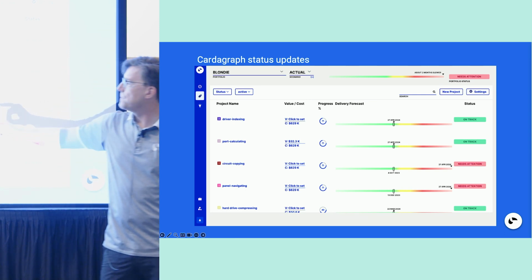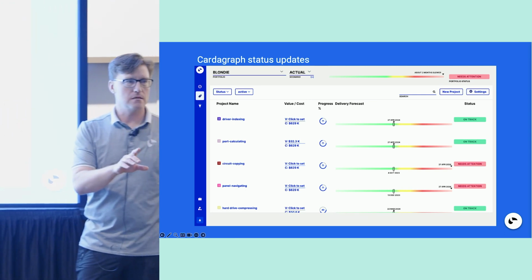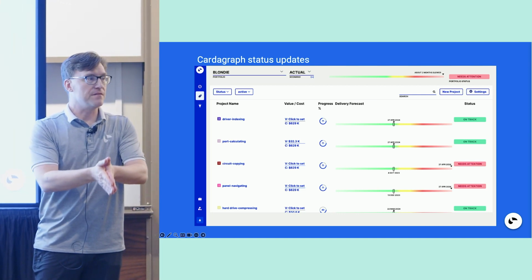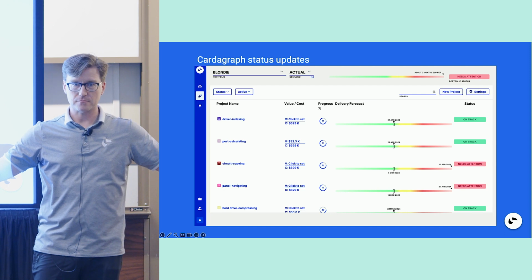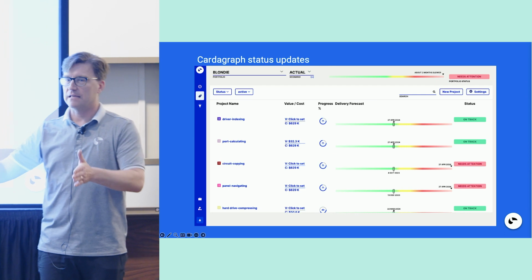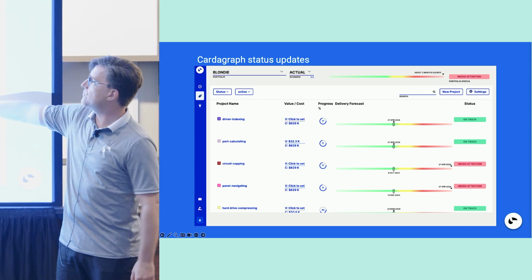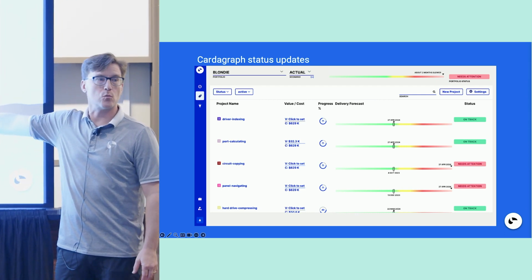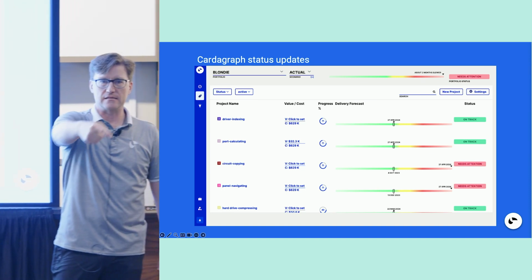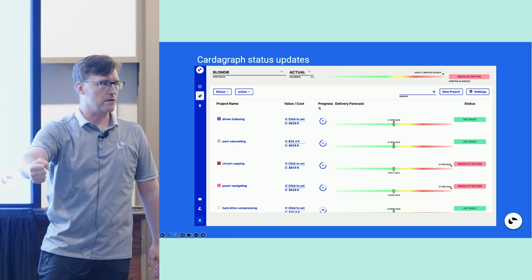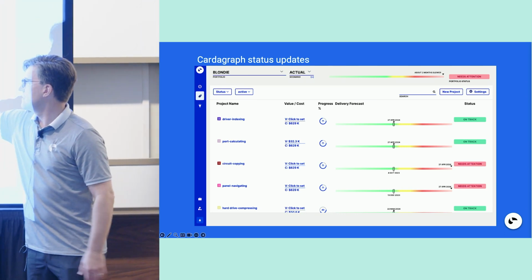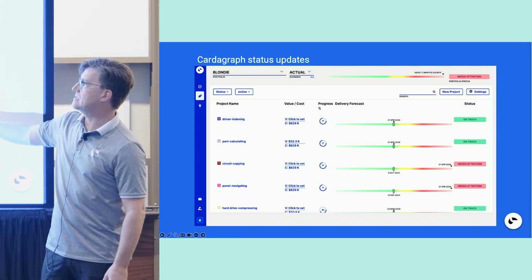This one, though, was one that we committed on October 4th, for October 4th delivery. And then scope creep happened. Or we completely missed the boat and we had to completely re-engineer the whole thing. And so it pushed the date out. This is the estimated delivery date based on what work is left to do. This is the delivery date that you chose as kind of a line in the sand. We put a postmark out there. That's all it is. But now you can see that you have slowed down, and this project needs some attention.